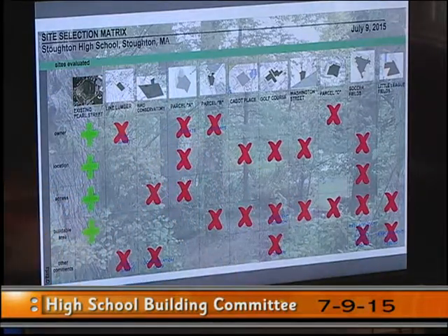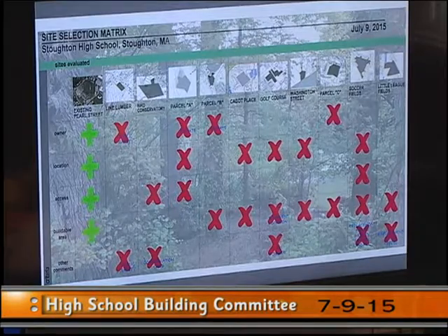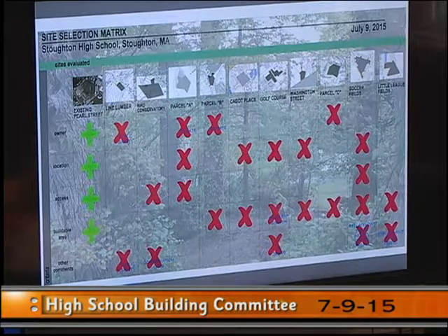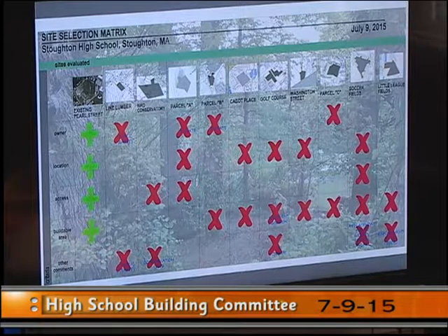The only issue with Line Lumber is who the owner is. It's identified as an option for the public safety building? That's probably the big one. The buildable area was okay. The location was fairly central, not too bad, but not as good as the current one. I think we came to the conclusion that you had to buy some lots to make the whole thing whole, to get frontage. So it would require purchase. That's the only real viable option, as an alternative to the school building that's there.